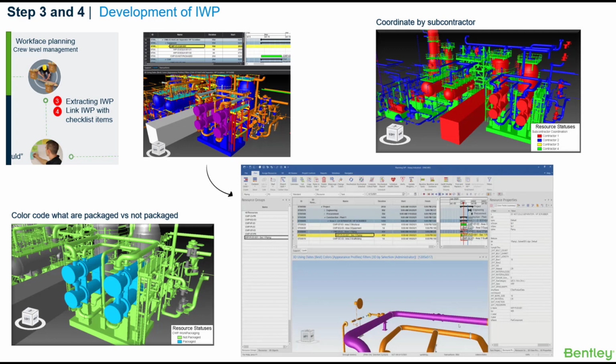We want to include 100% of the work necessary to complete the work package. At this stage, do not exclude any components, even if you know you have constraints that are not cleared, for example, missing drawings or materials. The goal is to create a proper grouping of components that makes sense for the field to install regardless of if you're seeing constraints or not. We also want to ensure we do not account for any component twice.